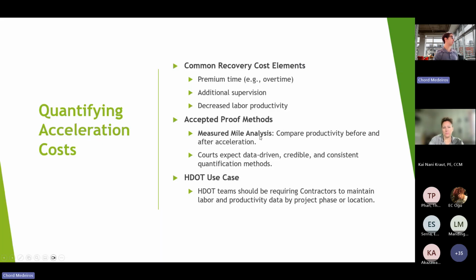And then some accepted proof methods. If somebody asks, how did you come up with this? I know we referenced this in previous trainings, and some of you may not call it the measured mile analysis, but essentially that's a fancy word for comparing productivity before and after an acceleration. So taking a look at the productivity of two separate activities and seeing the difference between the two.